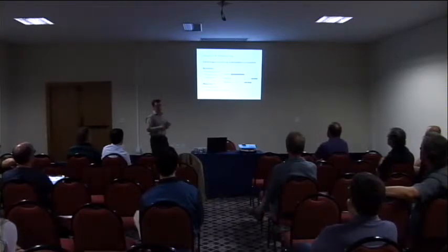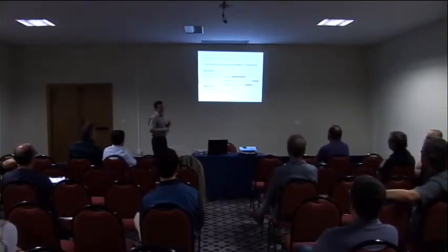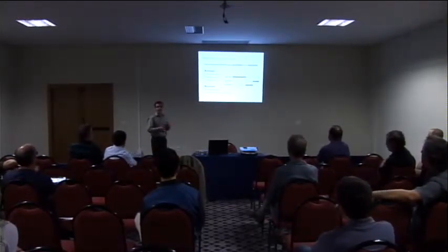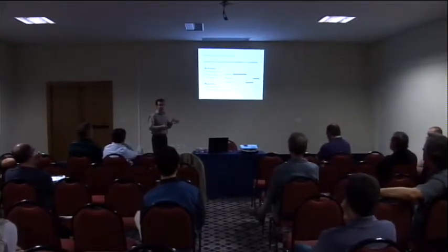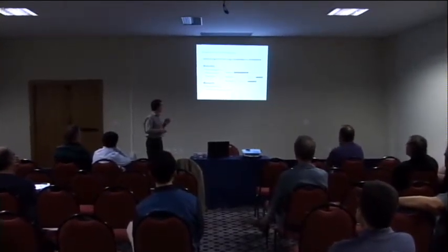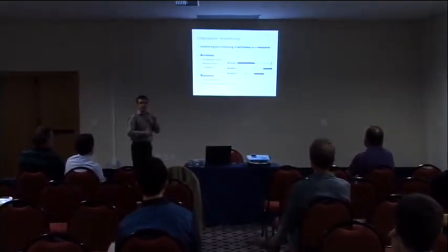So the activities have a processing time, and they must start after the release time, and they must end before a deadline. For the resources, we assume that they are non-preemptive, so once you start executing an activity, you have to process it until it ends before starting the next one. And the main property is that in a resource, you can only process one activity at a time.